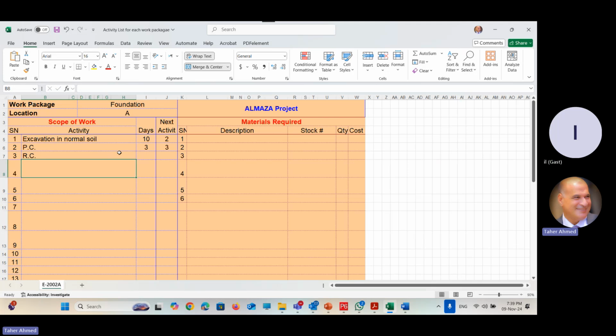But who will make a relation between the different packages? The project manager and the planner. Again, this is my way of doing the work: do the work outside of Primavera first, create a document representing the work breakdown structure, create a document representing the activities needed to complete each package in the work breakdown structure, then move it to the planner to put it in Primavera. And this is what we are going to learn now, how to add activities in Primavera. Clear?